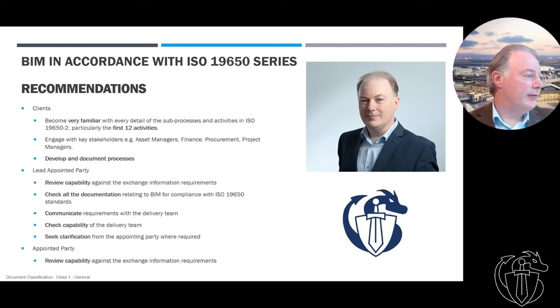From a client perspective, clients need to get very familiar with the activities in the ISO 19650 standard, particularly the first 12, because that's where it starts. You need to engage with asset managers, finance, procurement, project managers, whoever's key stakeholders, whoever uses that information essentially, and develop and document those processes.